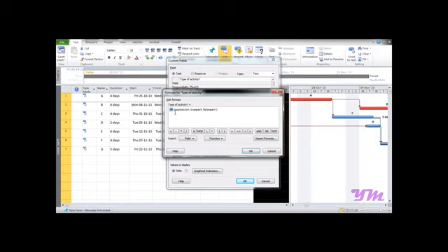It uses double if. Okay, now we can select the expression part, and here we don't need to type. We can also type, but the easier way is to select the field directly. So as per our case, we want to test that if total slack equals 0, then critical activity, or else non-critical activity.